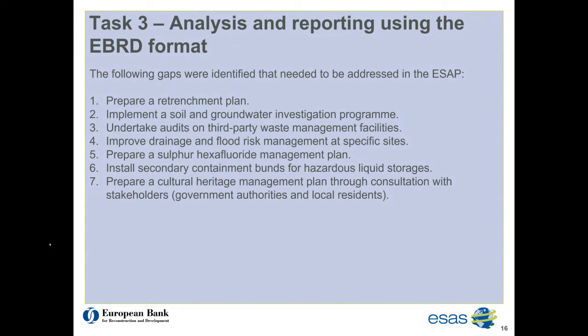The client also needed to implement a soil and groundwater investigation program to check for the presence of contaminated land under and surrounding the previous electrical transformer equipment containing PCBs, and an audit on the third-party waste management facilities and companies that were to be used for the collection, treatment and disposal of the old electrical equipment also needed to be undertaken.